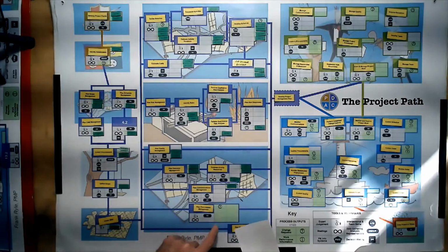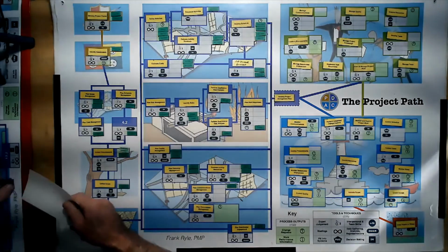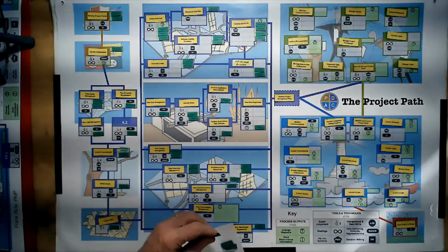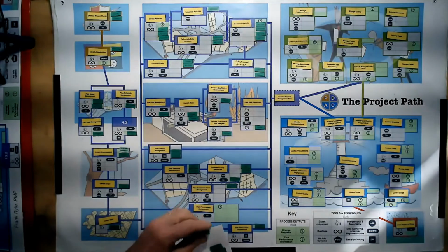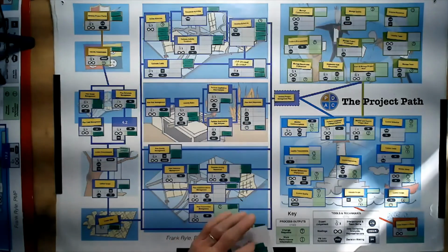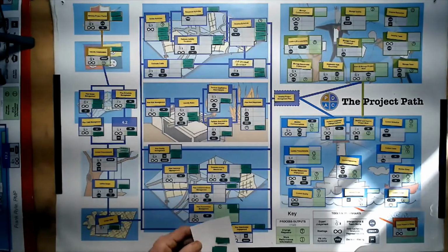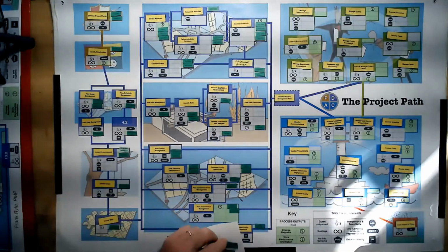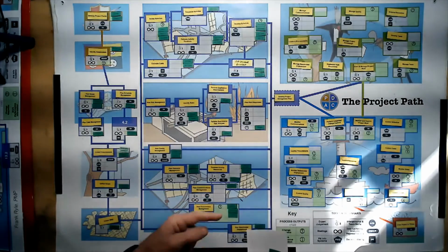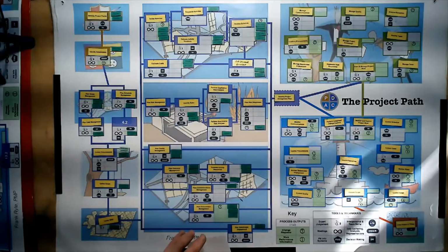Now you can see here that we have a lot to do with procurement. And I'm going to put these down. There's no order to these. Obviously in the PMBOK, there's no priorities, but it's just that they might make it easier for you to remember them. So the first one, and I think it makes sense, will be the procurement management plan. That makes sense because we plan procurement management, and it'll be the procurement management plan. Now there might also be a procurement strategy. That would be something that I hope would be part of your organizational process assets, and also source selection criteria. So the source selection criteria are the rules, if you want, that you're going to use to select the vendors when you get into execution and you do the bidding process.